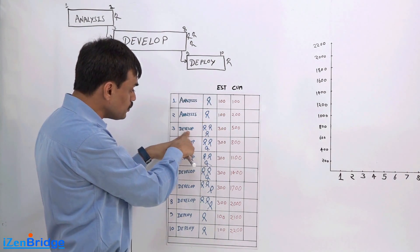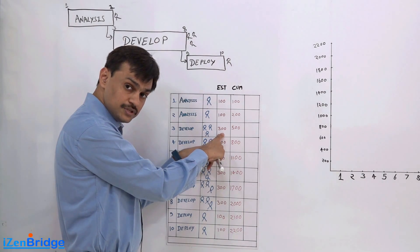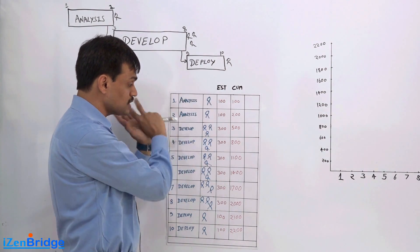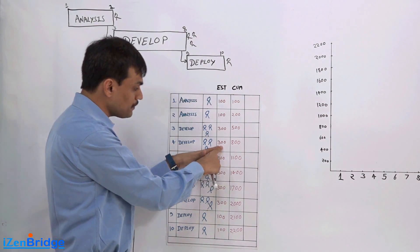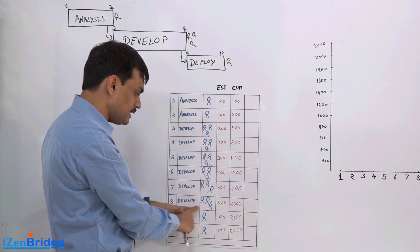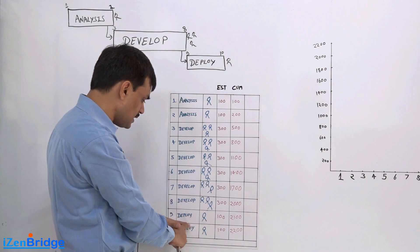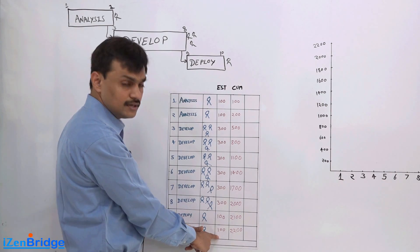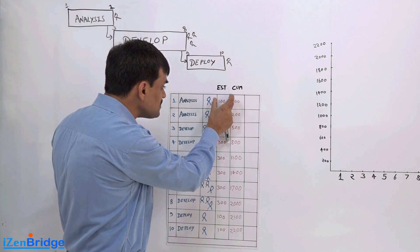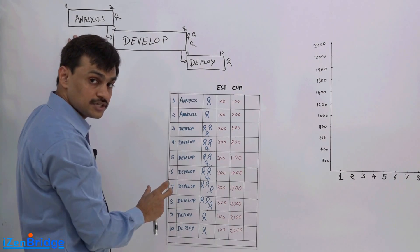On day 2 also I'm doing analysis, one person working on it and I'm putting $100 to this. On day 3 I'm doing development, I'm putting $300 to it because there are 3 people. Day 4 development $300 and till day 8 we are spending $300 and in deployment we are spending $100 and $100. This is like an estimation per day for this particular project.